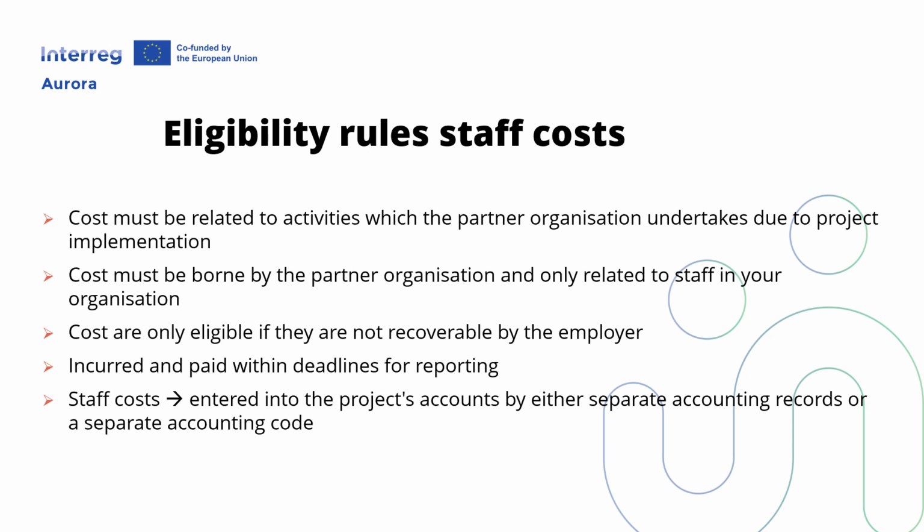Staff costs need to be incurred within the project time. Staff costs that have been incurred and/or paid before the start date are not eligible. Same goes with staff costs incurred after the end date or paid too late. Costs should be paid within 2 months after the end date, but before submitting the last payment application to be eligible.